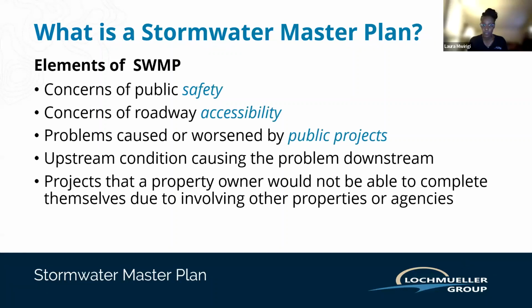One, first and foremost, public safety. Public safety is key to everything. Risk to life and property, and most importantly, risk to life, is the first item that is reviewed anytime any infrastructure project is graded or prioritized. If it causes any risk to even one life, then that becomes a high priority project.